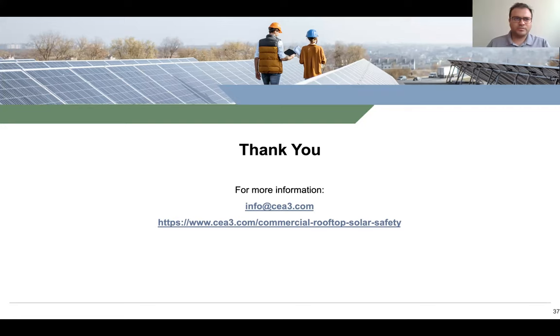One of the ways to do is, there are a list of trainings that I would recommend. I have 3 points in my mind. First thing is, while the site is being built, it's recommended to have the inspection done in the initial stage when they are just completed with 10 or 15% of the array. In the industry language, we call this a golden row. So we are called onto the site when the golden row is completed and we pick out the issues so that they do not get copied onto the other part of the system.